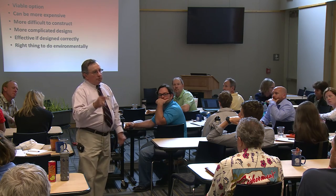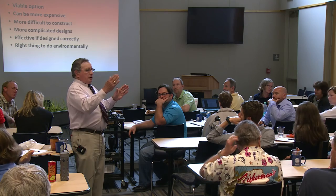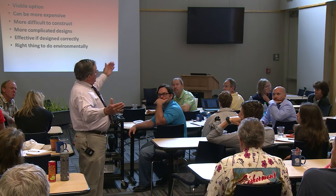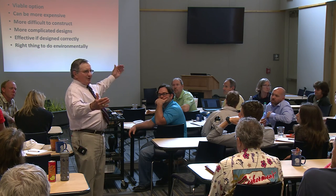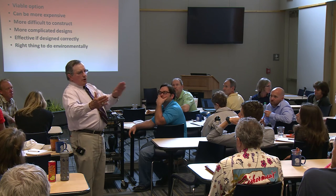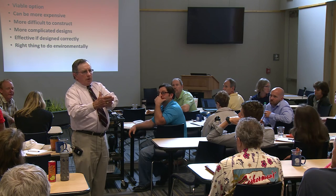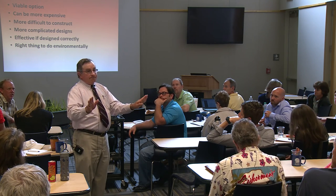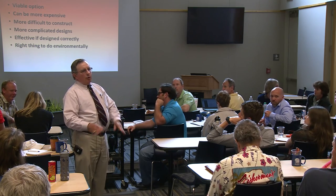But generally, if you time it right, I have a Wetlands Board meeting next week. So if you knew the timing, and you submitted your permit application the previous month, you would be on this month's agenda, and if you had all your ducks in a row, you would be approved in 30 days. Public hearing, adjacent property owner notice, the whole nine yards.